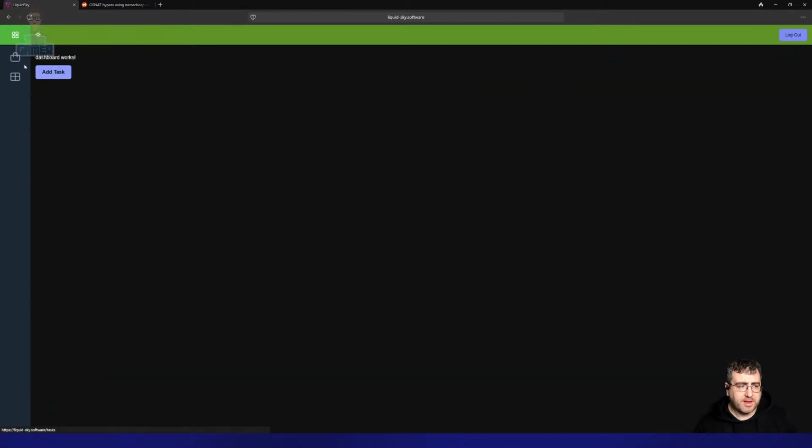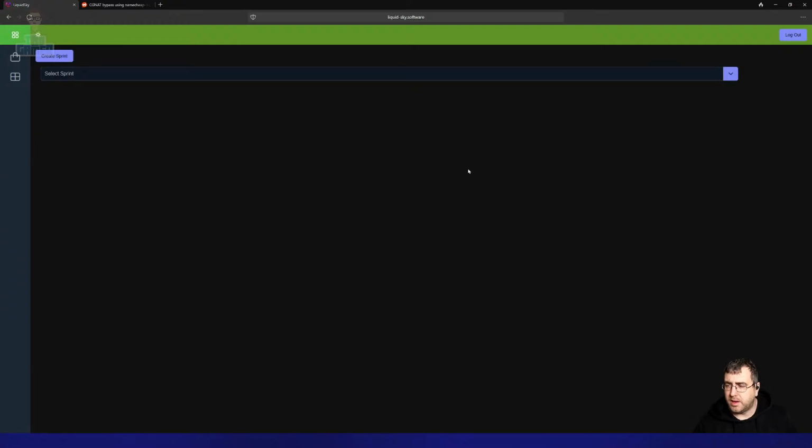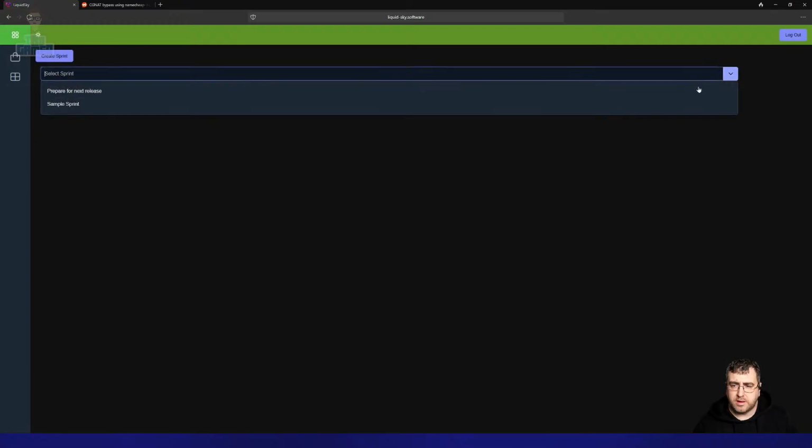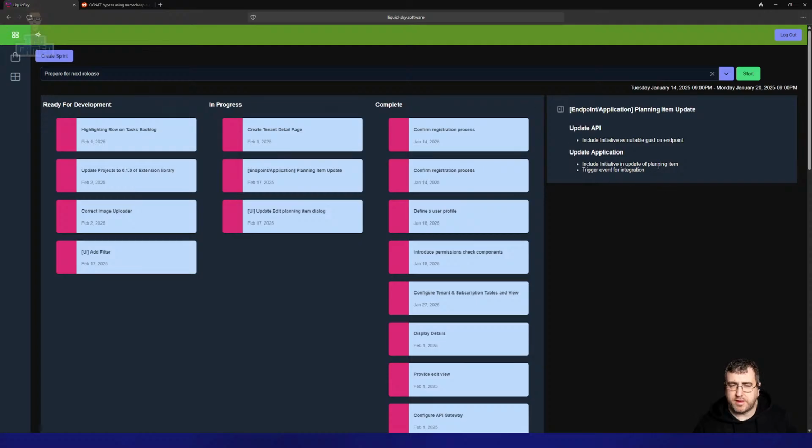If we go over to the task side of things, this is more where the developers would work in. And the sprint we have, right? More Kanban right now than sprint. They can look at this and see what they need to work on and be focused on those pieces only. So they can build out the tasks specifically for the thing they need to do. So these tasks can be technical, they can be small, but a requirement is built up of many tasks.